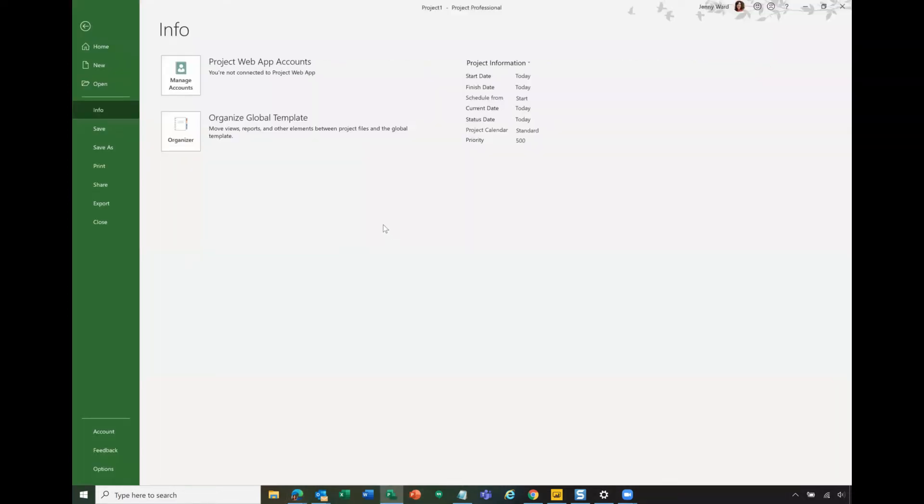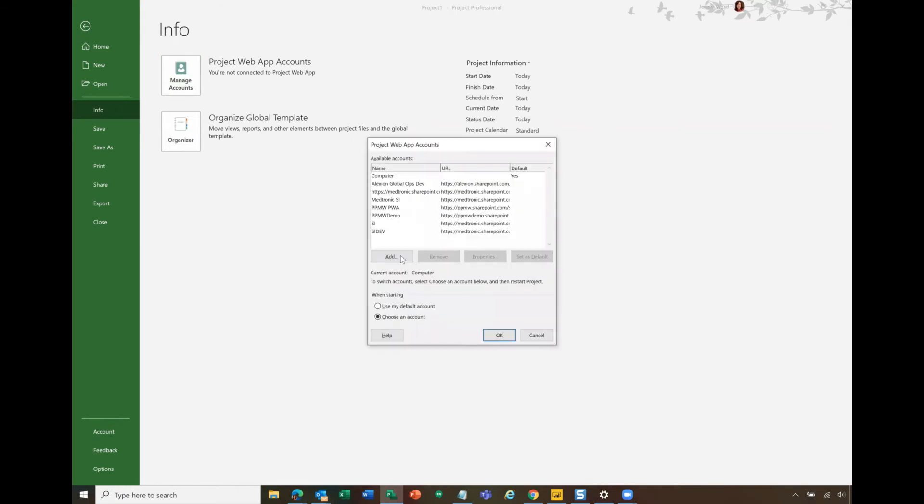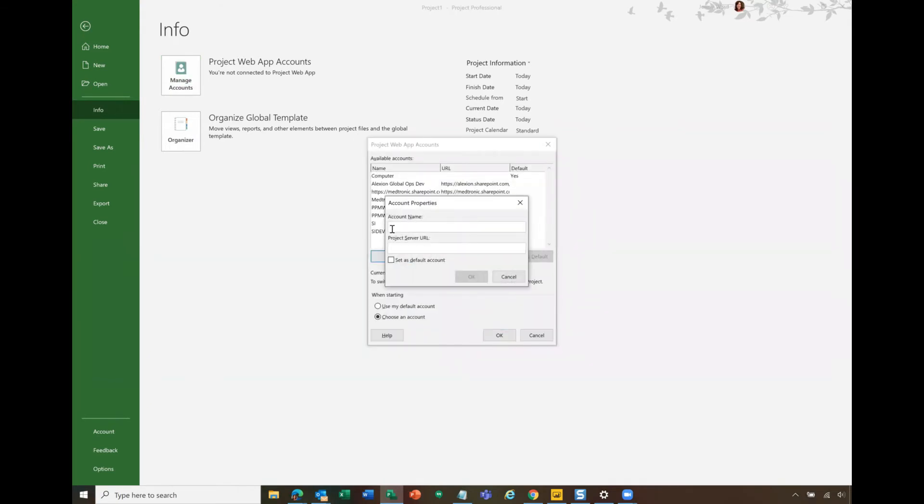Then in Project Professional, I typically open a blank project first. Then I go to File and the Info tab. On the Info tab, you're going to go to Manage Accounts. You're going to add a new account. I am going to call this PWA demo. I'm going to copy that URL.